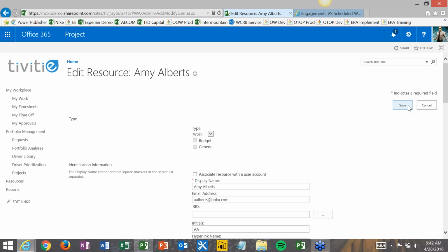But generally, you'd create your high-level resource plan with those generic resources. Then you would get some resources given to you. Then you'd go out and build out your project schedule and you would assign them to each particular task. There wouldn't be any particular way to know which resource should go on which task automatically. That's something that you would still have to plan into your schedule yourself.